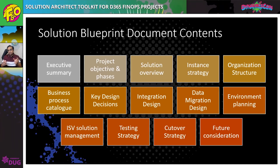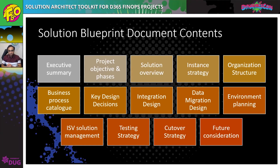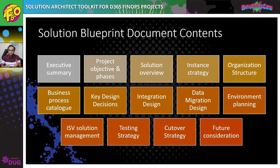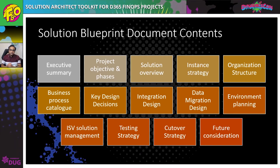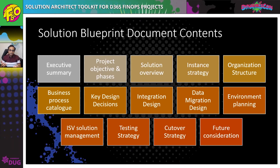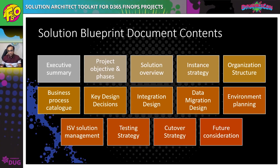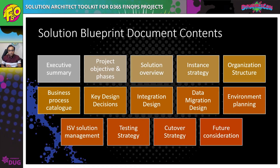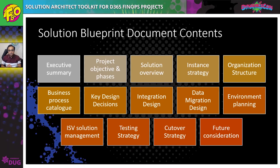In my experience, the solution blueprint document is around 40 to 50 pages. Some companies also make a PowerPoint file which is easy to read, but the objective is to cover all key areas in a summarized way. Key design decisions are those decisions which, if changed, can have a bigger impact on the project. This could include things like how many tenants are used, whether you use a non-production tenant, whether you use product variants, or whether you use advanced warehousing — these should be decided early and captured in the blueprint.